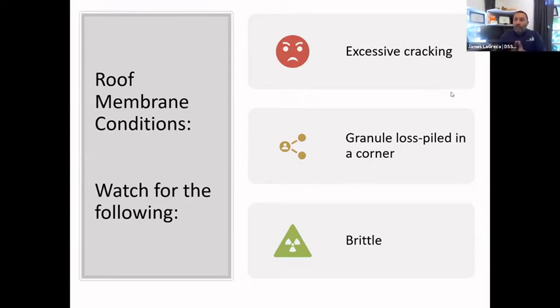And if it's properly planned from that point moving forward, we also tell them you're never going to pay as little as you're going to pay now, because you have to take escalation costs into consideration and you have to take the increase in deterioration into consideration. So addressing the issue as best as possible at that point in time is definitely the way to go.